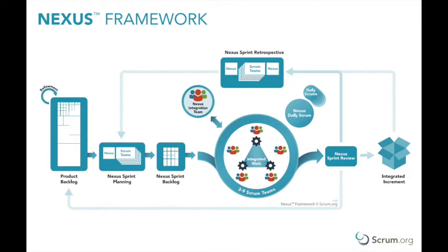Nexus consists of, first, roles. A new role, the Nexus integration team, exists to coordinate, coach, and supervise the application of Nexus and the operation of Scrum so the best outcomes are derived. The Nexus integration team consists of the product owner, a Scrum Master, and Nexus integration team members.